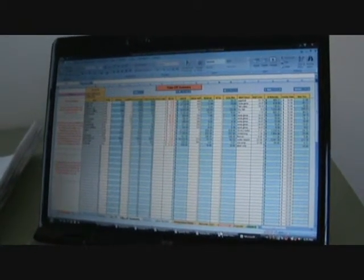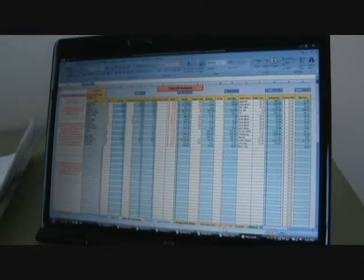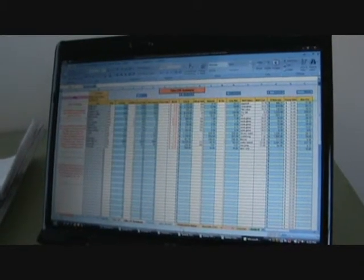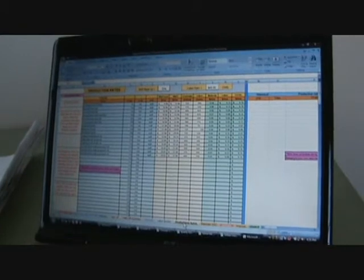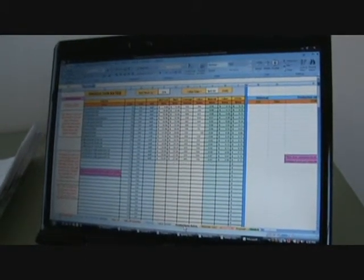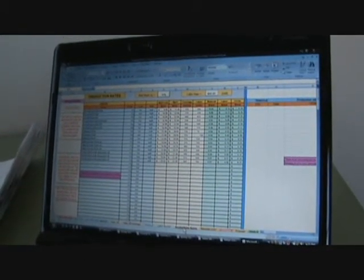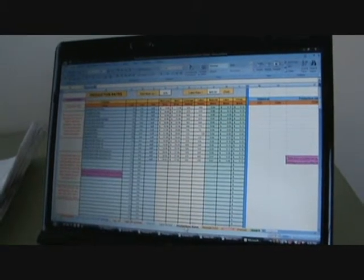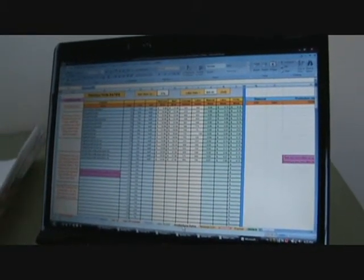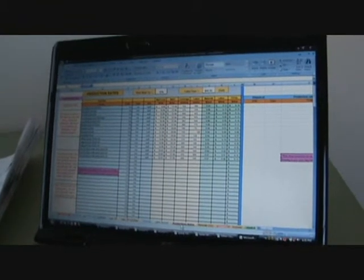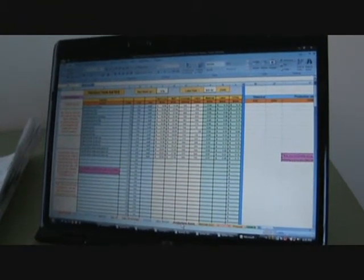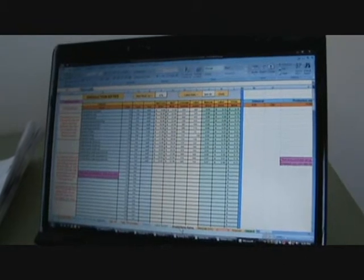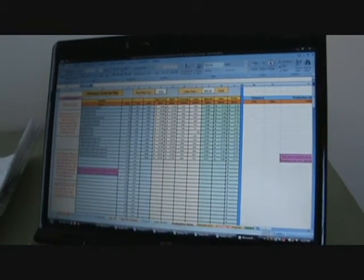So once you get your, this is a square foot method. There's a sheet here for production rates, you can do your own files on how much things cost per square foot, different labor rates. You pretty much build your own database there. The means or walker will give you square foot industry, square foot prices.